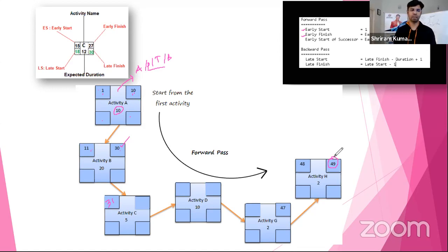By the way, it's just an example here. It does not have multiple paths; it's having only one path, so it's pretty tough to see other paths also. Let's imagine this is one of the critical paths here, and it has 49 days of completion. The next path can be 42. The next can be 33. But 49 will be the critical path. When it is a critical path, its float and slack will be 0.